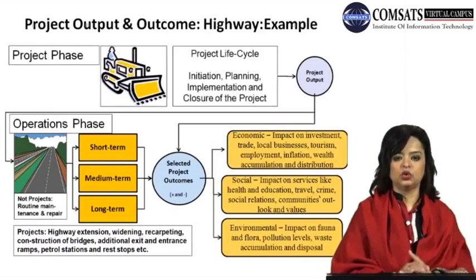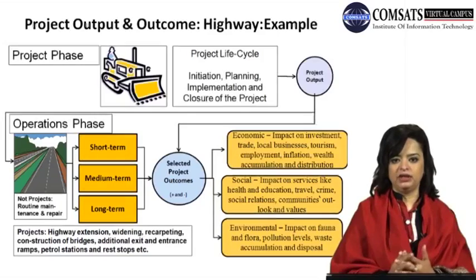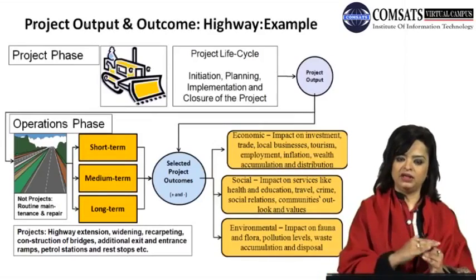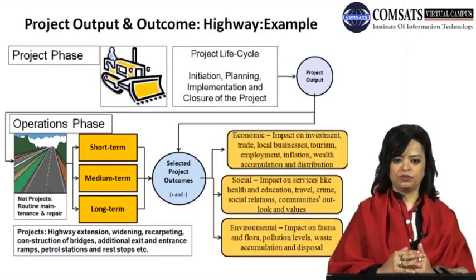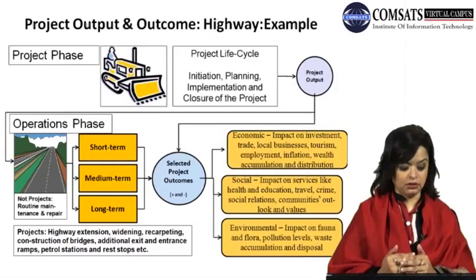Widening, where you are adding a total new lane to it. Or the recarpeting of it. If it's not considered part of regular maintenance, like filling out the potholes and making sure there are no visible cracks on the road, and the driving conditions are considered normal, then the recarpeting effort would be considered a new project.